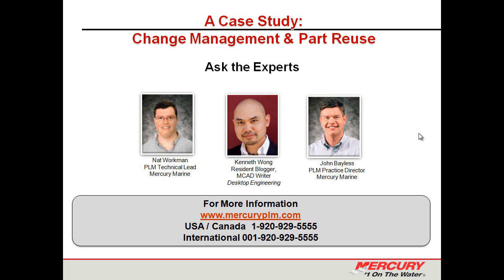It's a two-part question. How many different homegrown systems was Mercury Marine using previously? And part two: what was the system consolidation strategy when migrating to Teamcenter? Sure. We had 3 legacy systems, and we took a line in the sand approach where we said the legacy systems would be used up to a cutoff point, and then they'd become read-only, and all work going forward had to be done using the new system.